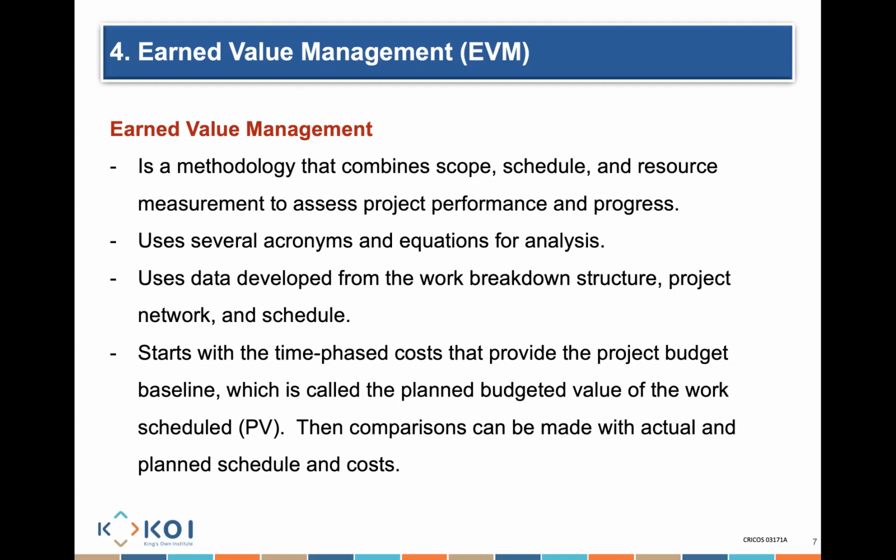Earned value minus planned value. Okay, that's called what? Schedule variance. And what's the other one? Schedule performance index equal to earned value divided by planned value. Very well done, Shristi. That's amazing.